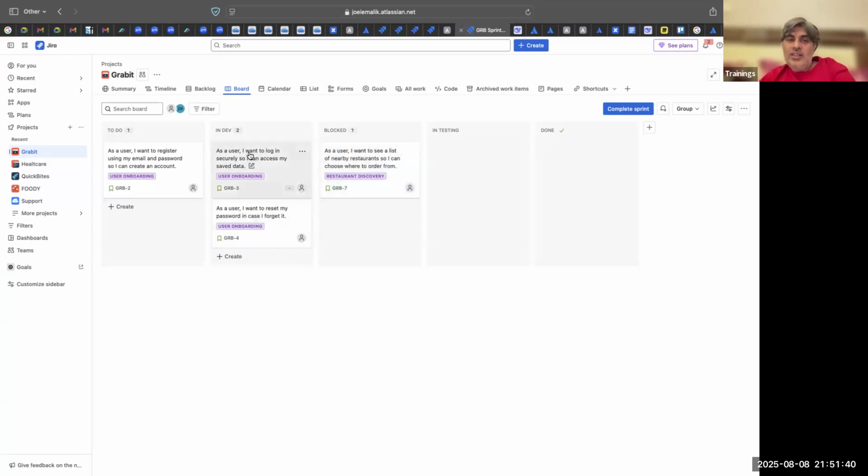DSU starts. This guy says, yeah, I have no blockers, this story is going fine. The other guy says, yeah, I am also cool, there is no problem, I am going fine. This guy says, boss, my story needs a UX designer. It was supposed to be delivered yesterday, but I still haven't got any UX design from the other team. So he will block his story. Then after the DSU, either this developer will talk to the other team, or you as the Scrum Master will talk to the other team and find out why there is a delay and try to resolve this issue.